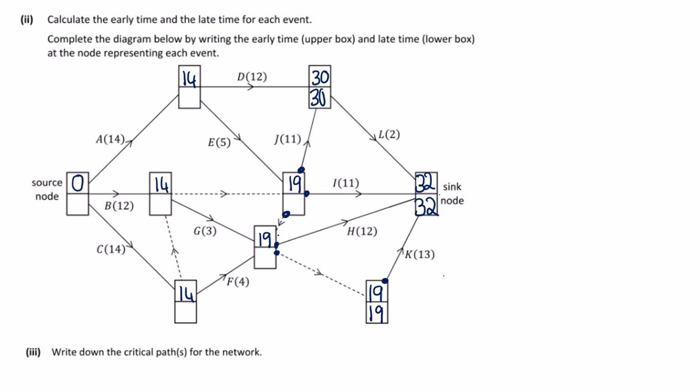Here we have 2 activities. We have H and we have a dummy. The dummy will give us 19. H will give us 20. If there's more than one, we always pick the smallest. So this is going to be 19.